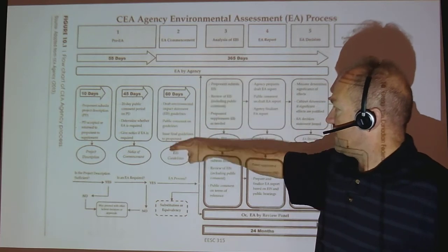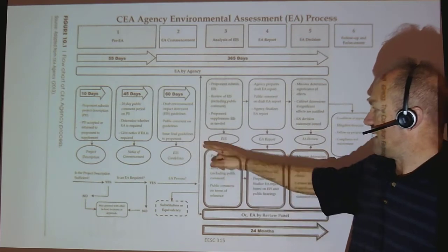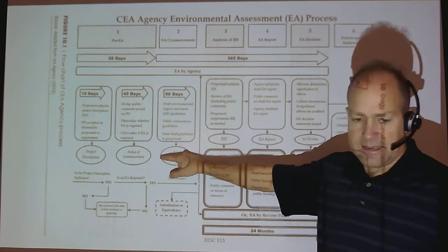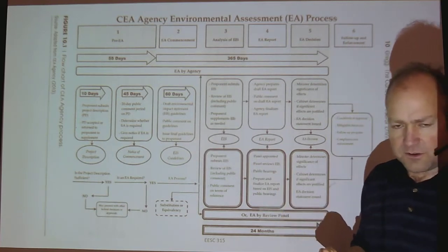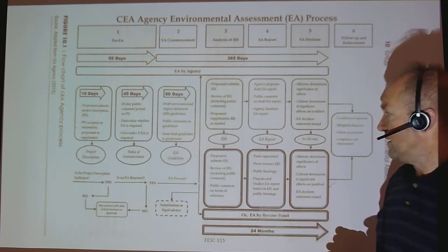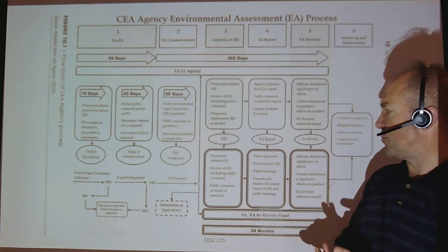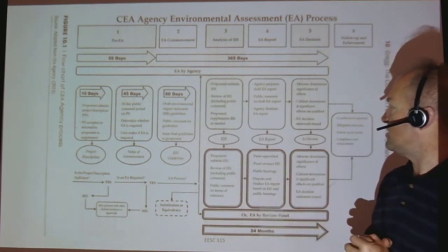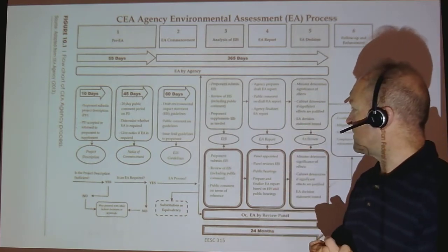draft guidelines, public comment on the guidelines, issue final guidelines to the proponent. So that's referred to as the EIS guidelines, which is basically the same as what I referred to earlier as the terms of reference or an application information requirements. So an application information requirements is what they use in BC, the terms of reference in Alberta, EIS guidelines federal. It's all the same thing, just different terminology. It basically lays out all the requirements of your environmental assessment.